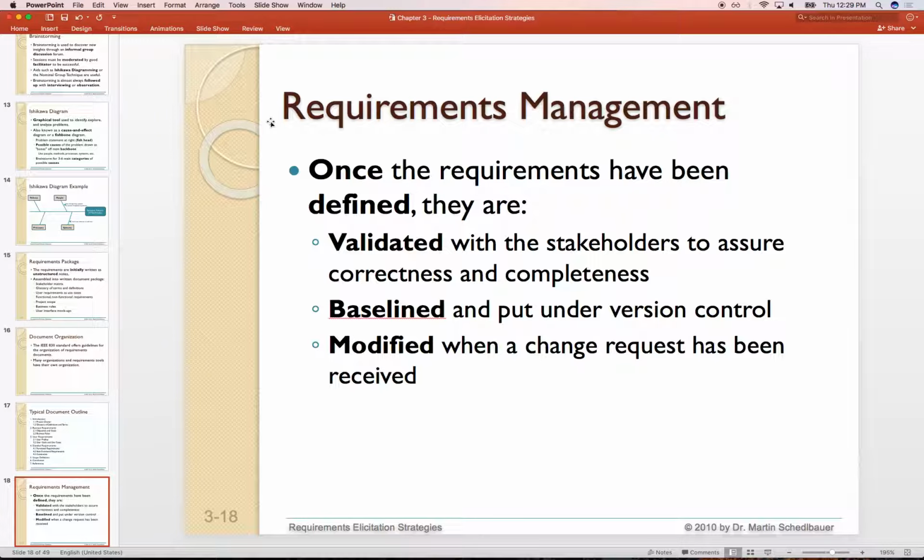We have a process in place every week. If somebody raises their hand and says that things might change, the requirements change will be submitted to a committee. The committee will look at the changes, and some of them will be accepted, some of them will be rejected, depending on the priorities and depending on whether they can be validated.